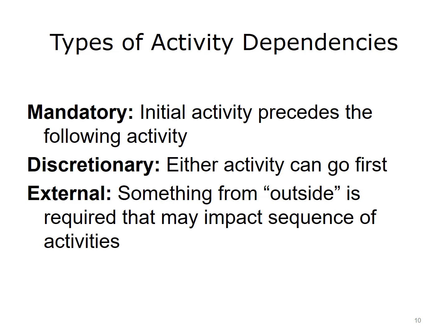For example, you can't erect a structure until after the foundation is built. You can't paint a wall until the drywall is complete. And you can't test an application until after it has been developed. Discretionary dependencies involve using best practices when sequencing activities.